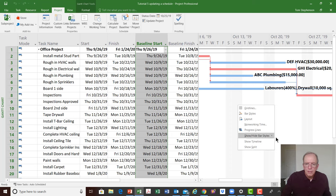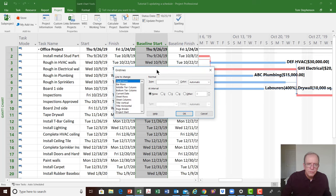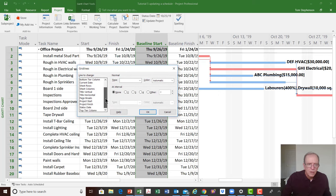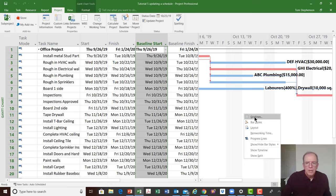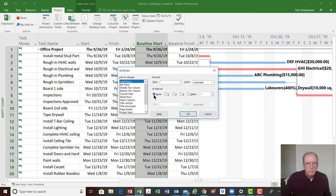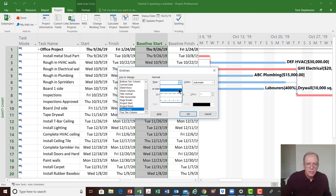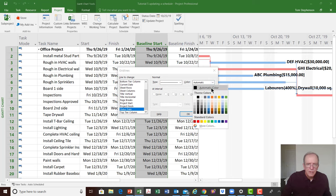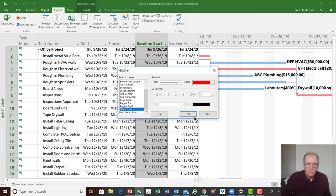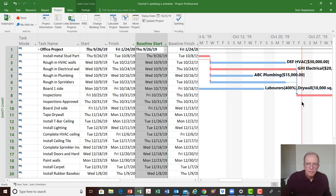Once I've set the status date, I'd like to see the actual status date line on the Gantt chart. I'm going to right-click in this blank area and select Grid Lines. You can customize a lot of different views in Microsoft Project. I like to see the status date visible, so I pull down the menu until I see Status Date, select a solid line type, make it red, and click OK. Now you see a red line on the chart — I know that this is where I'm updating the project schedule to.